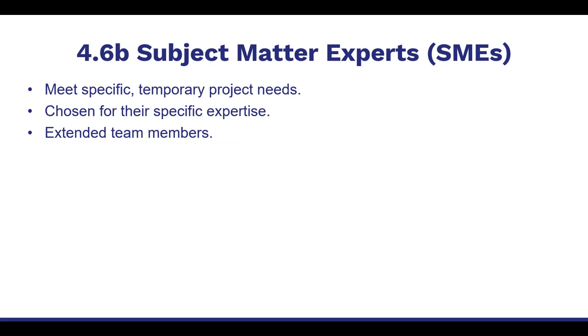Now let's talk about subject matter experts. The acronym for that is SMEs. Subject matter experts meet specific temporary project needs. They're chosen for their specific expertise and they're extensions to team members. SMEs may spend only a little time on a particular project and therefore may not invest their expertise and time into it fully. Typically, a project manager would have a newly assigned SME review the charter and the minutes from the last couple of meetings before discussing the actual project.